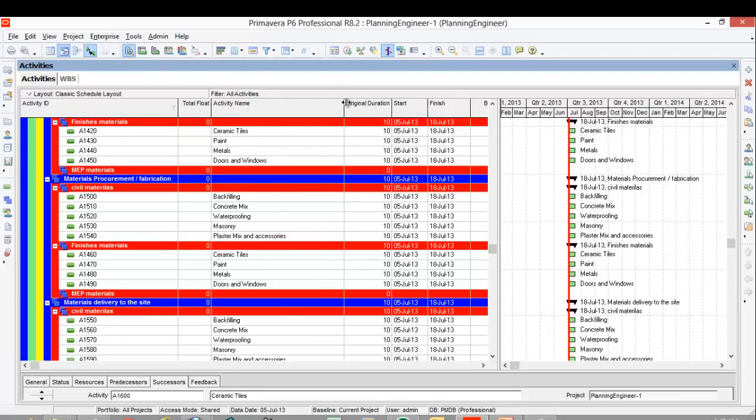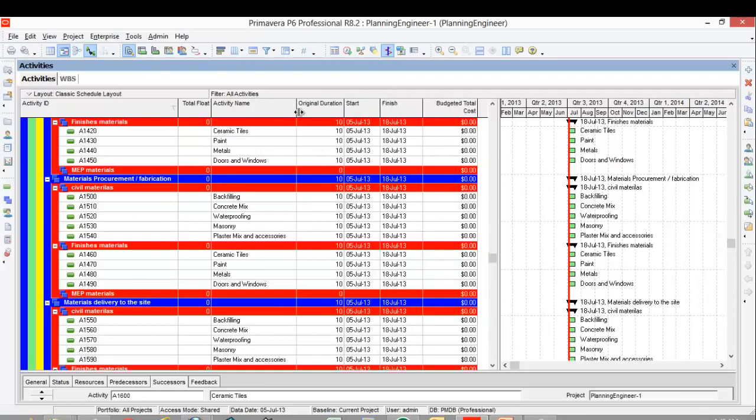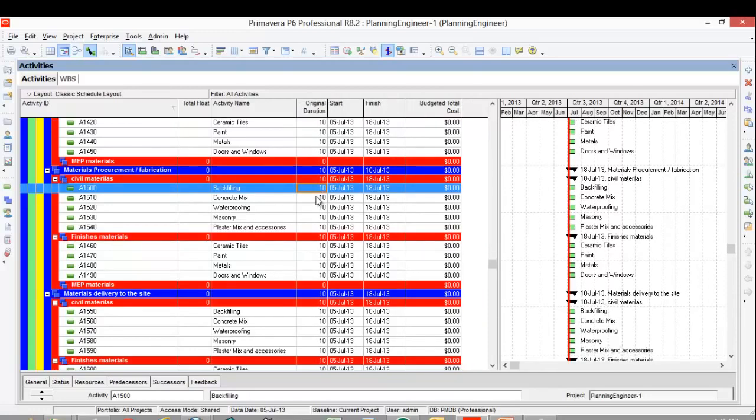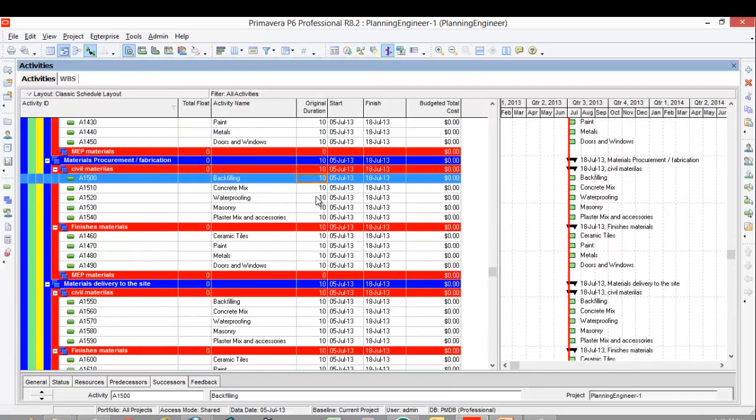This is very, very important and could impact your dates, because if you have any long lead materials. So for now, I will assume some dates, and in reality, I'm assuming these dates as well. Then I'm giving them to the procurement department to confirm, or if I already have the information, I'm putting them directly